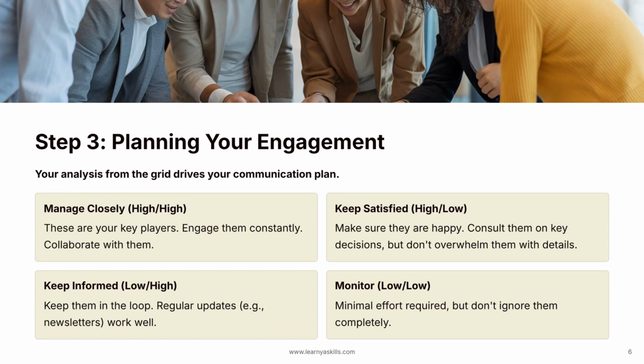This analysis is useless unless it drives action. So, for step 3, we use the grid to create our engagement plan. For the Manage Closely group, your project sponsor, for example, you engage them constantly. You collaborate with them, seek their input, and treat them as partners. For the Keep Satisfied group, like a busy department head, you consult them on key decisions that affect them, but you don't overwhelm them with daily details.